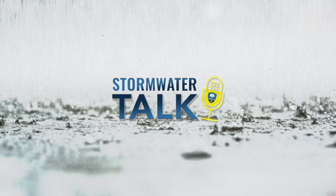So we can say, okay, well, if this house flooded, this is how many dollars in damage it's going to cost to repair it. And then we add up all the costs of damages, and then we say, let's put a project together so that we can eliminate or reduce those damages. And if the cost of the project is less than the cost of all the damages, then we say it's a good project. So the data that's fed into the models, we get the simulations with the goal of accomplishing one of the goals of the Stormwater Master Plan, which is this proposed list of projects.